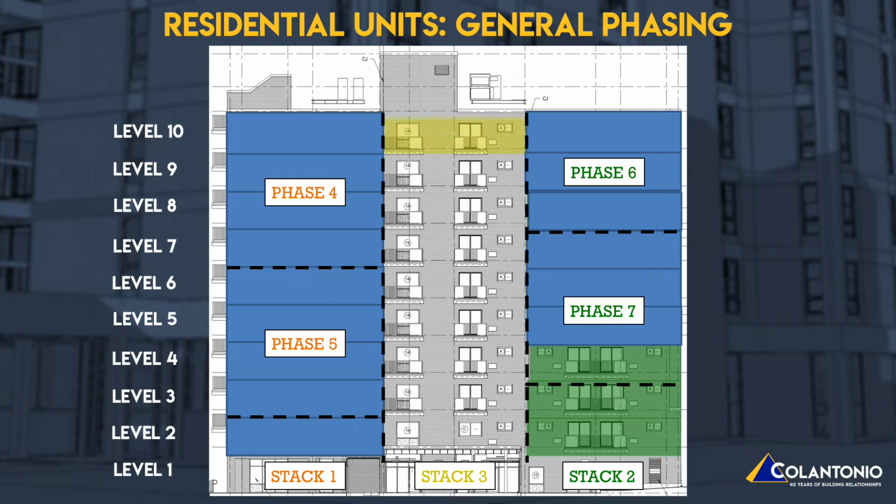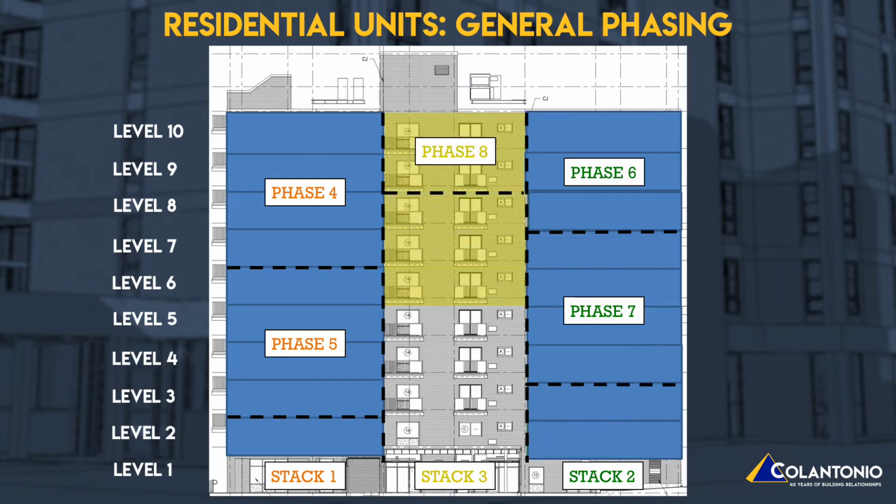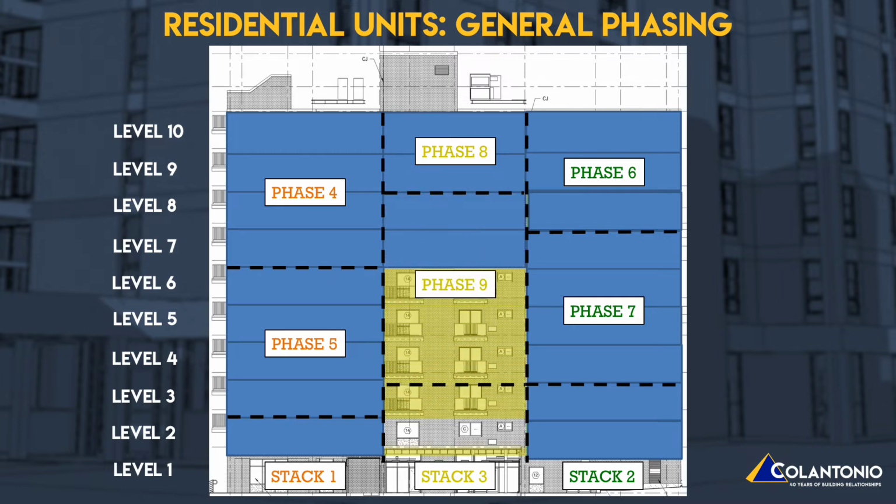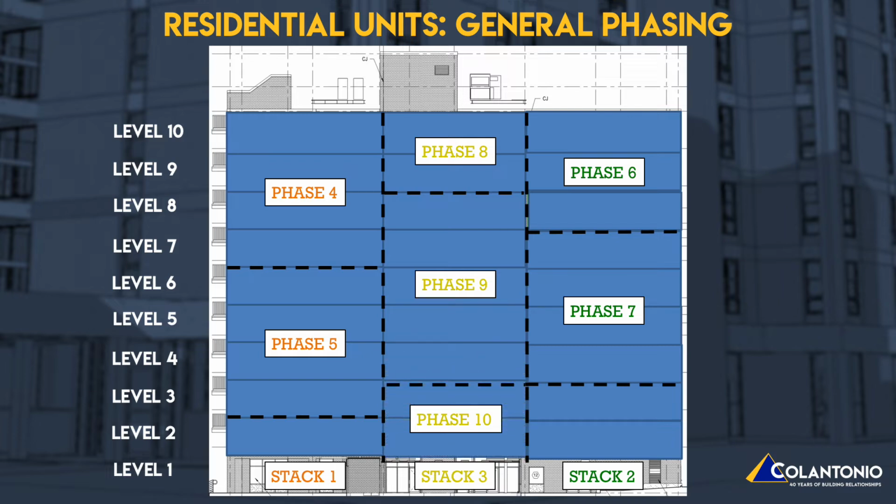Leapfrogging floors allows for there to always be vacant units beneath ongoing construction activities in the level above. This facilitates through-floor penetrations for riser piping and associated work between floors. This becomes an important factor in the ability to complete the necessary HVAC work.